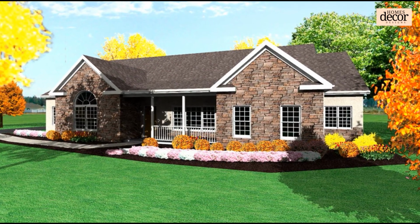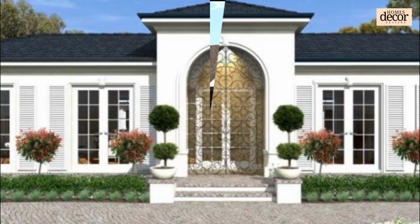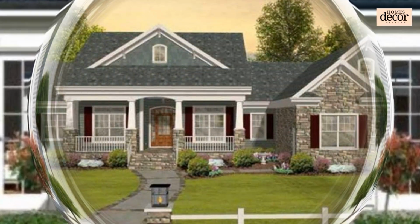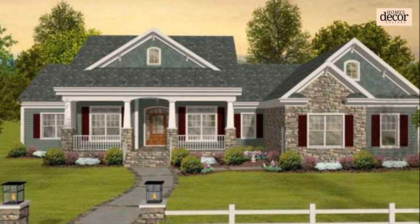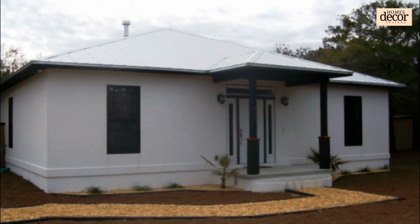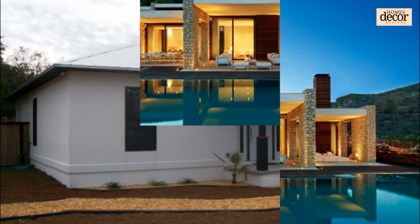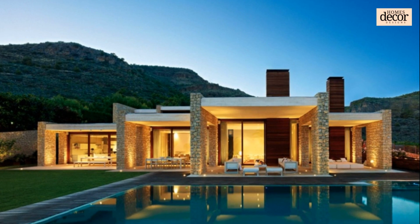Those considering an addition will also want to keep the seasons in mind. If building begins in fall, it could easily get pushed back to a winter finish, meaning plastic tarps may be the only insulation between the home and the exterior until construction finishes. Will you be living on-site during the construction or off-site? How will the property be secured if you are off-site? Knowing what you're getting into is the best way to ensure a smooth first-story addition to your home.